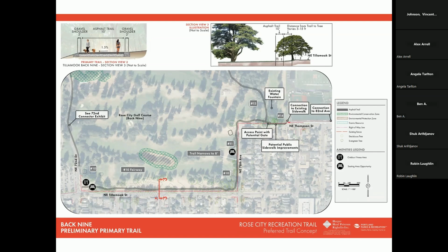I can't hear. Okay. Donnie, you're muted. Donnie. That's a great question, Catherine. Thank you for asking that. We have walked the sites many times with our urban forestry, and in order to receive a permit to build any of this, our urban forestry has to sign off on whatever we build. And so the trail is aligned outside of that tree root protection zone.